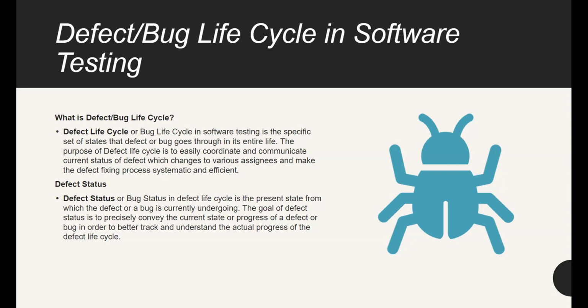So stakeholders will be able to know, okay, in this testing that was done, about 200 defects were raised from the application. But as of now, 50 have been closed. If only 50 have been closed, that means the application cannot go live because you need to correct the other defects, right? And then maybe in the next meeting, they say, okay, the 200 defects that were raised the last time, how many are now closed? So it gives you a concise way of actually tracking the defect.